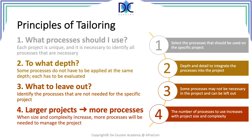When we see all these elements, it looks like we have so many things to do, and we have to comply with the principle of tailoring. Tailoring is basically adjusting the level of detail to the size of the project. When starting a project, the first question is: what are the processes I should use? Every project is unique and we have to identify what is necessary and how deep we need to go.